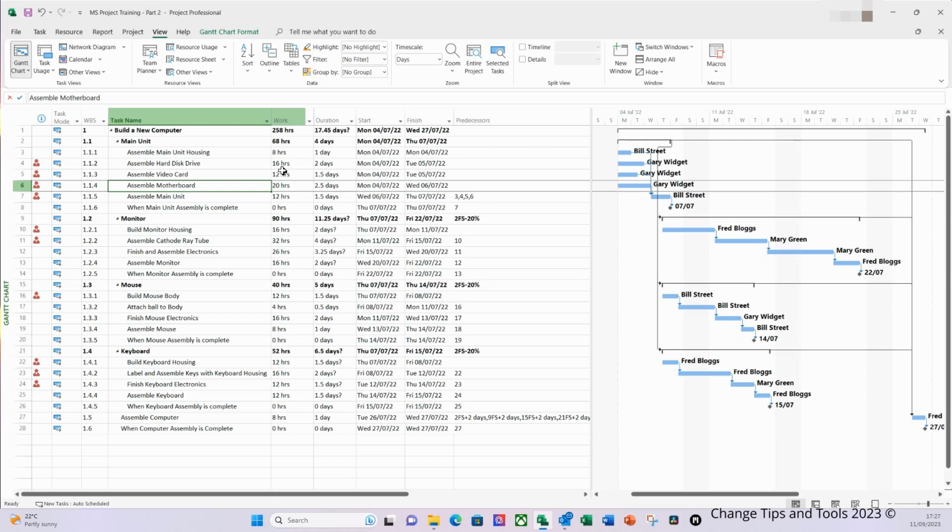They then manually maintain the duration of that task in line with the project, and each time that timeline slips or changes, they manually maintain that task. Now, I don't think this is the most efficient method within MS Project to do this.